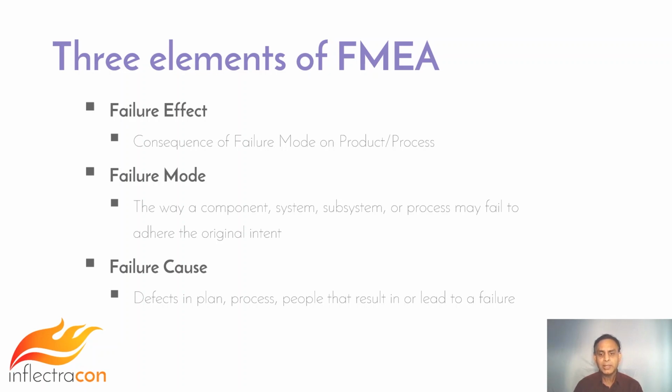While it is quick to call this a defect, the FMEA engages in root cause analysis deeply, looking at the project plan, processes used, tools employed, and the capabilities, skills, and competencies of the people that worked, to see what cause contributed to what extent for this failure.